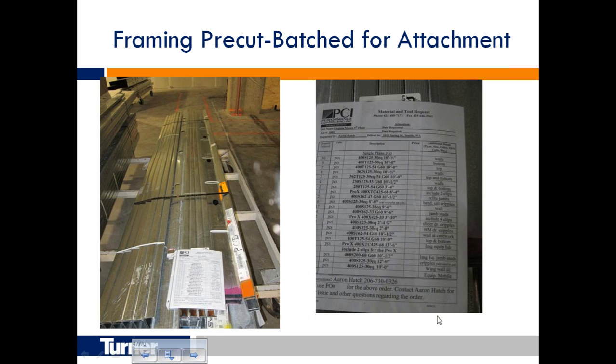The other part of the BIM processing, we talked about cutting down on the waste. You can see, again, the data comes out here is what exactly pieces are going to be here. On that last job, 95% of the studs came out pre-cut. They cut down on the noise. Also made sure that everything was aligned. Increased quality, which increased speed.